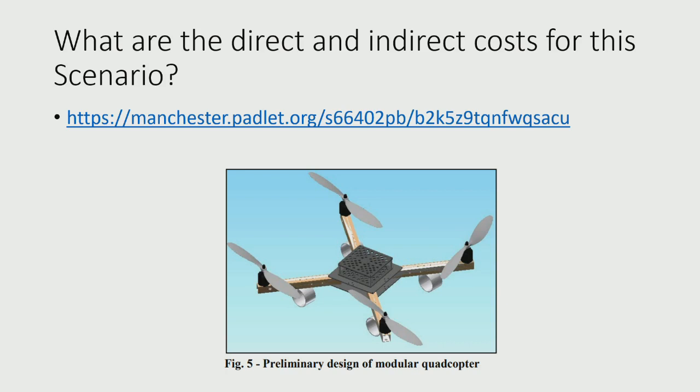there's also business as usual, things which happen on an operational basis, non-project activity, then you begin to see that you've either got people who are directly engaged on a project, who are adding value to the project, and people who are supporting the organization. So you probably cost a technician at a percentage of his time as direct labor. You would cost my time as a percentage as direct supervision. However, the facilities, the buildings, the heating and lighting would be a percentage cost.